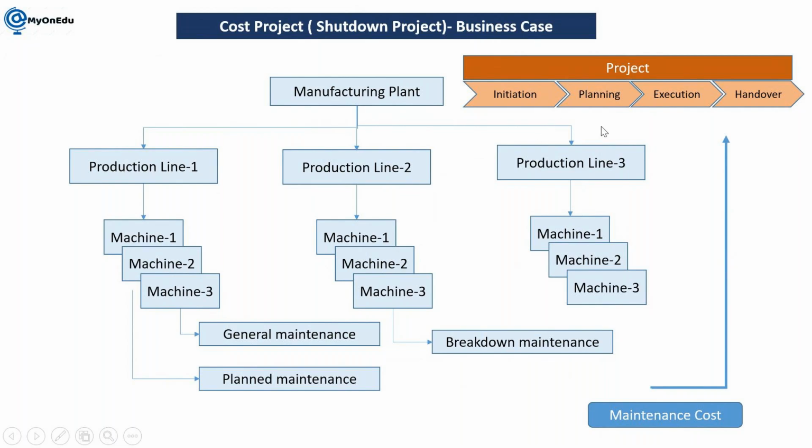Within the project system, whenever we schedule the project, all my orders will automatically be scheduled in plant maintenance. Then once all the maintenance activities are done and plant maintenance confirmation is captured, the cost will be available in my plant maintenance order. Further, it can be transferred and settled to the project, and then we can settle it either to an asset or to an expense account. This is a typical example of a cost project.